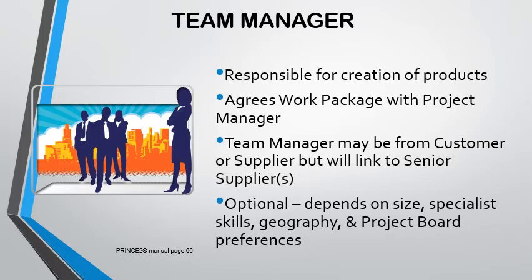The team manager. The team manager is the team lead of the teams that come on board to handle delivery of a project product. So their focus is always going to be on the creation of the products. They have to agree work package from the project manager. The team manager can be from the customer or from the corporate, and it can be from the supplier side, depending on the kind of environment where the project is being handled. And that work is always going to be linked to the senior supplier on the project board.